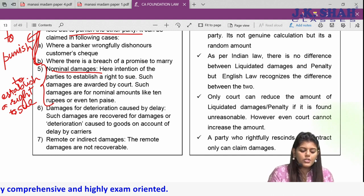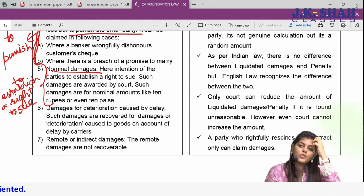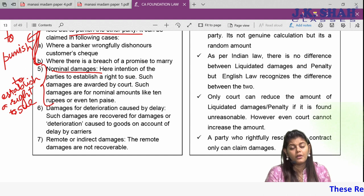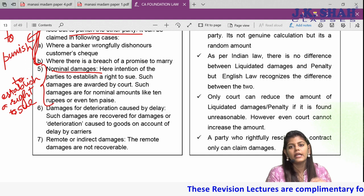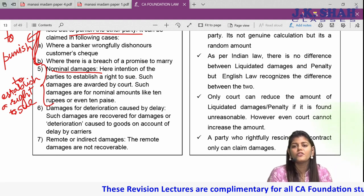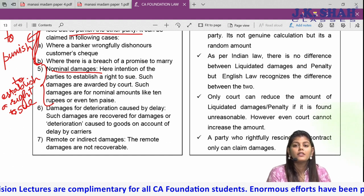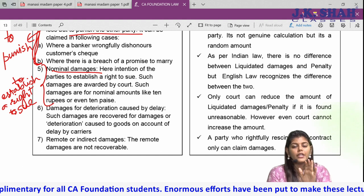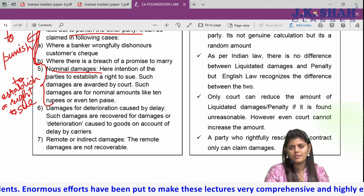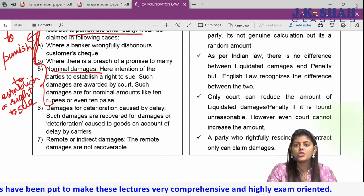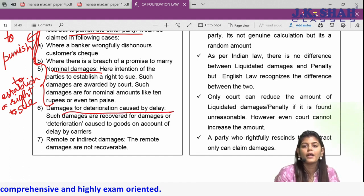Sixth type: damages for deterioration caused by delay. For example, if cement bags are being transported by ship and the shipping company negligently keeps them on the deck, rainwater and seawater mix with the cement, and by the time it reaches the shore, it has turned to stone. The client will not accept the bags, and you can claim damages from the shipping company — these are damages for deterioration caused by delay.